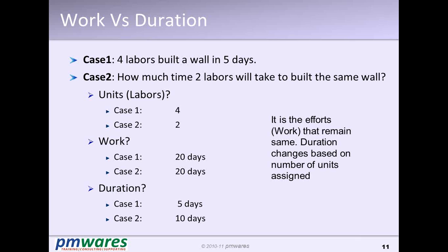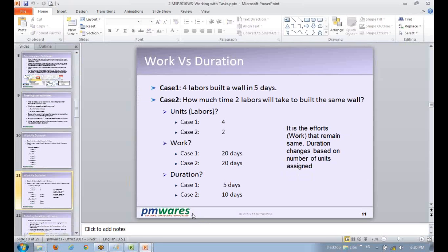Vendor, then what is that? The client has given you the software to develop, and you have the people who are going to develop. So the client is bothered about duration, because they want this project to happen within 6 months. Now it is you who bother about how many people are required so that I complete this in 6 months. That's how we should estimate.